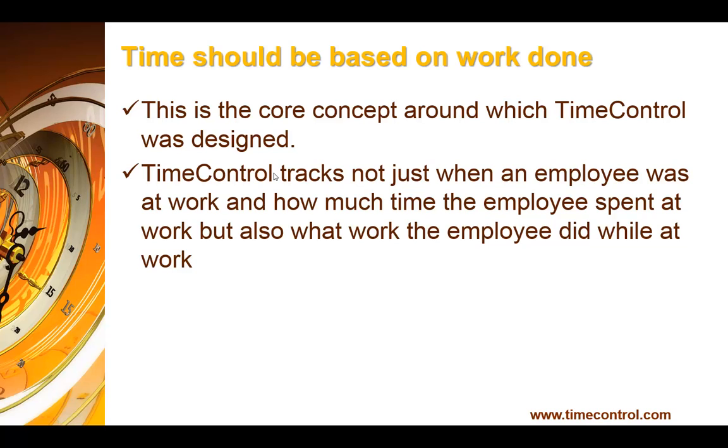So tying the project management functionality right into the timesheet system brings the timesheet right into the idea of progressing our work, and that focuses us on what people are actually spending their time on. When floor audits are done to say what are you actually working on, being able to match the timesheet to the progress on the task to the project schedule that's being advanced is a certain way of being able to say yes, we know that the right thing is being charged at this time.